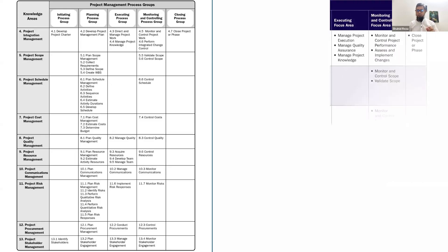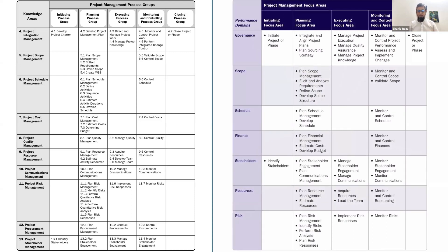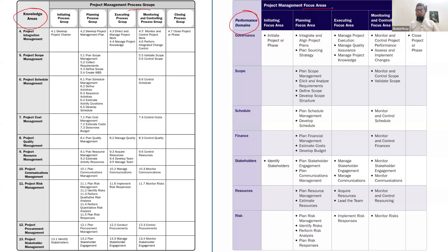Let me bring the latest edition from PMBOK 8. In the new edition, there are no knowledge areas. They are now named performance domains, and process groups are now called focus areas. Earlier there were five process groups: initiating process group, planning process group, and so on. Now these are replaced with initiating focus area, planning focus area, executing focus area, and so on. So in PMBOK 8, there are five focus areas.